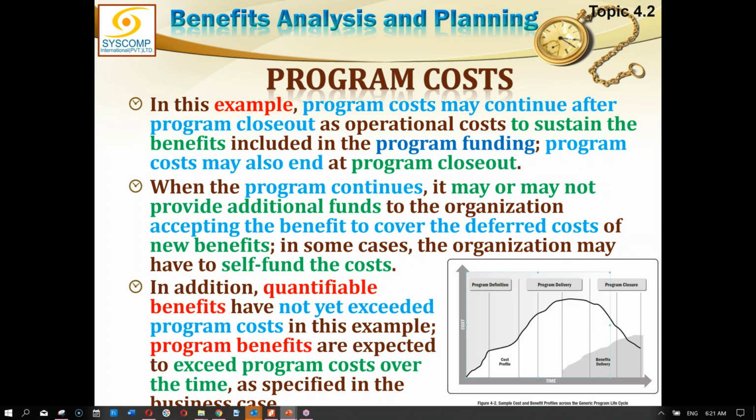It depends on whether you have a turnkey relationship or a relationship where you are actually supporting them through the first year of operation, because you have training or some other sort of learning curve. Yes. And there could be even another scenario, that at the end of my program, there is another, different program. In that case, I'm not handing it over to operations, I'm transitioning the output of my program to another program, and that cost will be converted into the other program's input cost.